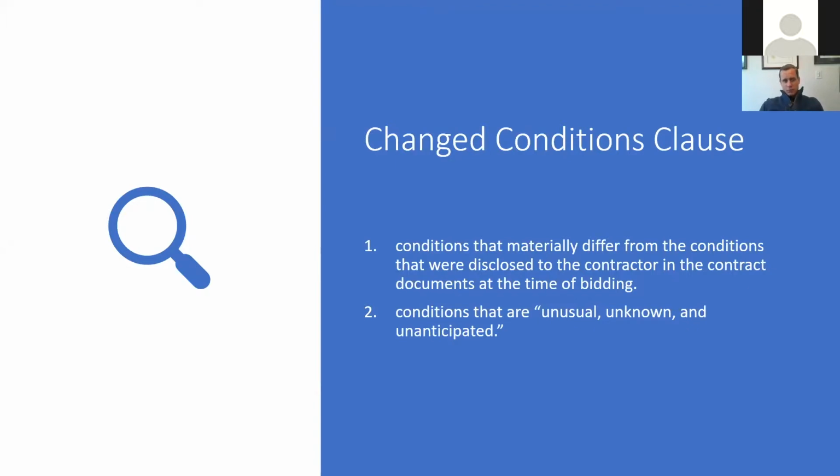And why that would be the basis for a change order is that the project has to stop, and authorities have to come in, and it needs to be investigated. So it's taking longer, and there's additional costs with getting the specialized folks out to the site to take care of those remains.